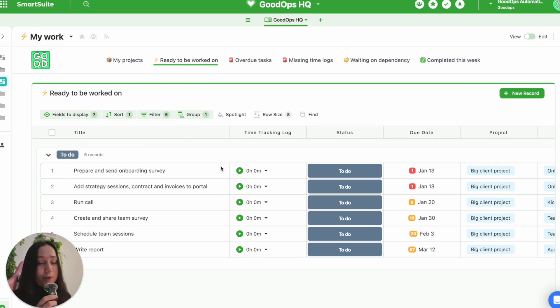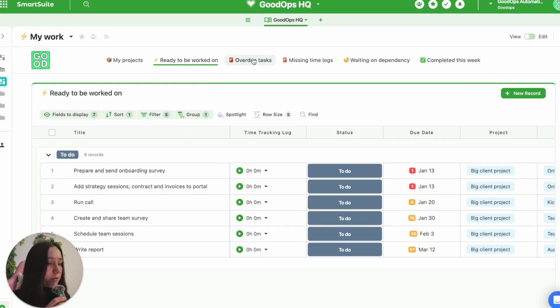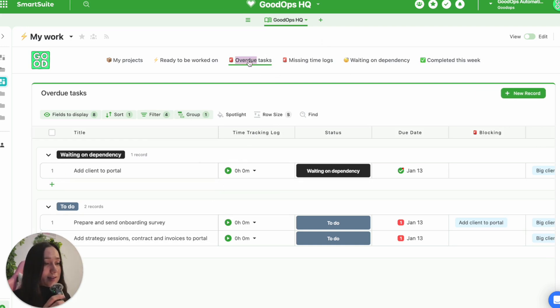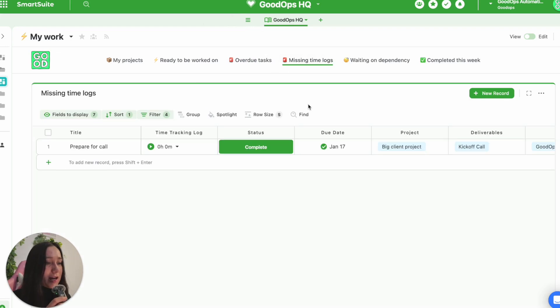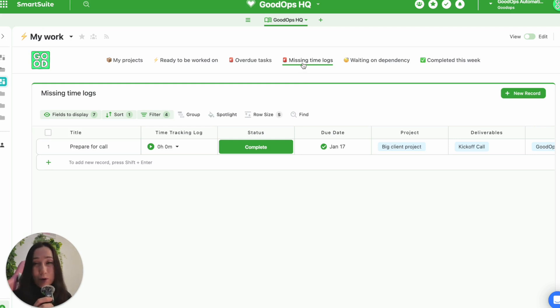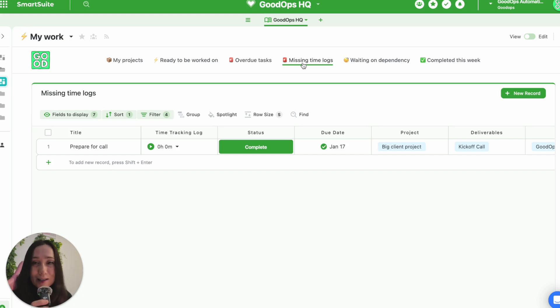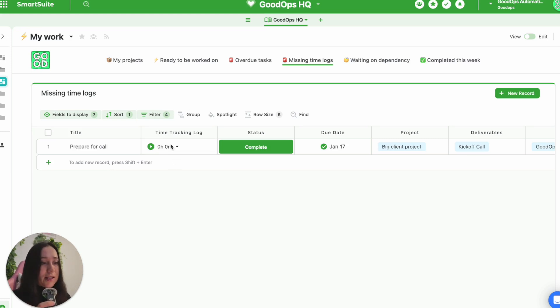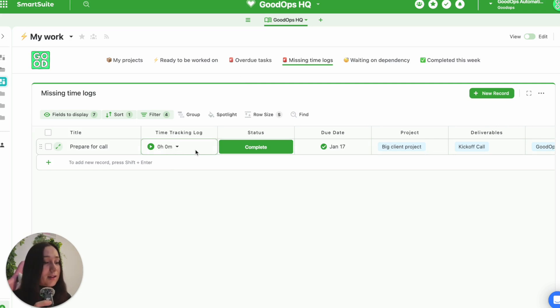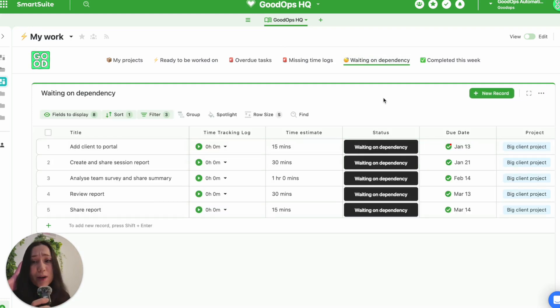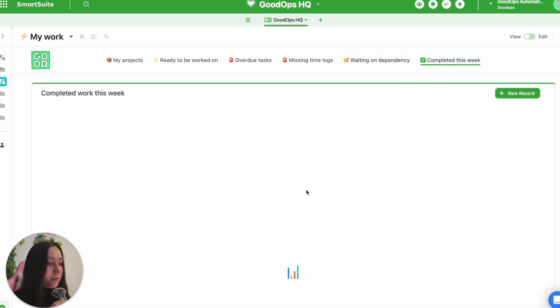So ready to be worked on, pretty self-explanatory. I then have a separate one with just overdue tasks. I think that's nice to filter out because tasks shouldn't be overdue. Another one which I am very much putting here for myself is missing time logs. So whenever a task is complete, but it doesn't have a time log, it shows up here so that I can at least afterwards manually add in that time. Again, as a new business, a lot of things I'm still figuring out. And something that's really important to me is understanding how long things actually take versus how long I think they take. And so the time tracking feature that SmartSuite has is very useful for me. But you do need to remember to use it. I've got a whole section about tasks that are waiting on a dependency. And then I've got another one which was completed this week.